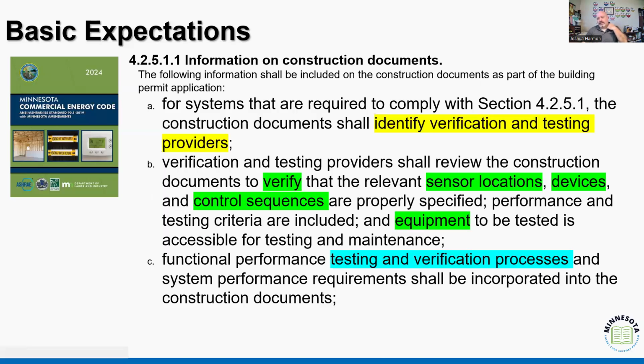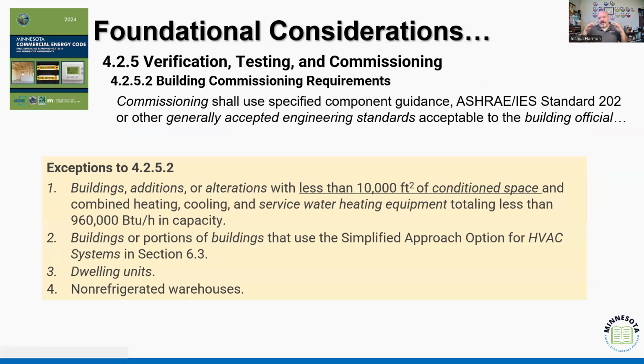And so when we look at that again, what we're trying to do is identify who is going to be doing the testing, what is being tested, and how are we testing it, right? Those are expectations that should be part of our plan from the beginning, right? Now there are always going to be exceptions, right? We know that there's going to be exceptions, and what the code tells us is that not only it gives us some basic understanding of some of those